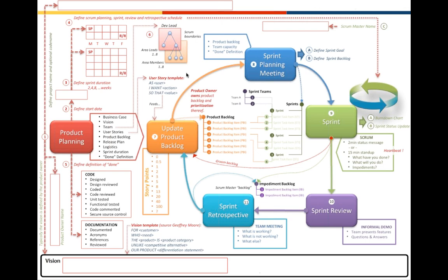If there is something big that you have to put out in that release, and it is not making it into that release because of your velocity, you would have to either put those stories up in the backlog, or trade those stories with something else that you have in the backlog that is going in the release, or you can move your release date.